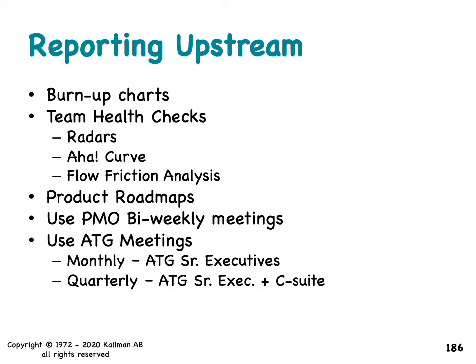For the reporting upstream, I prefer burn-up charts as compared to burn-down charts. Most executives are going to want to see burn-up charts because they don't like to see graphs that are pointing downward, because that usually means they're losing money. So they like to see graphs that are going upwards. And the reason that I really like burn-up charts is then I can put a t-shirt sized estimate of the backlog above it, and by doing trend lines, I can start to predict when either a project or a program is going to be completed.